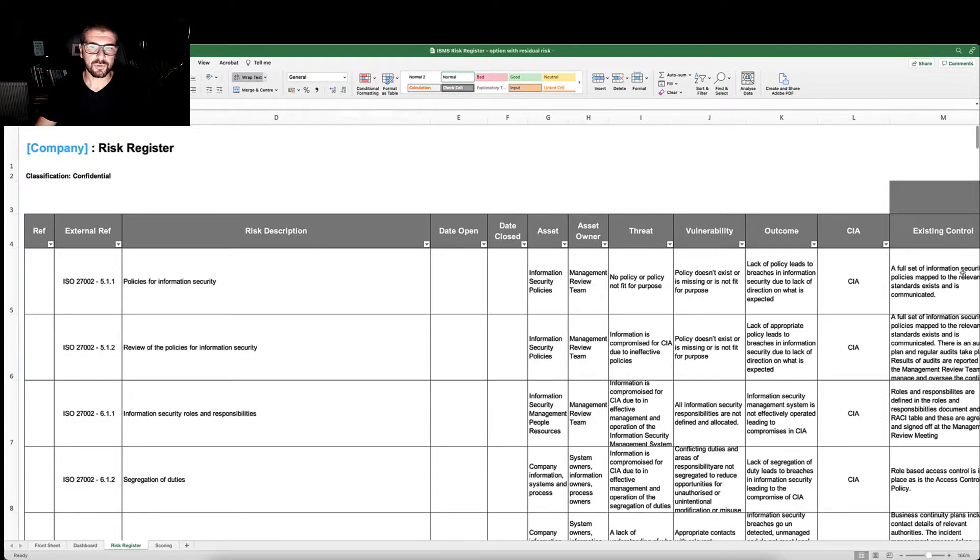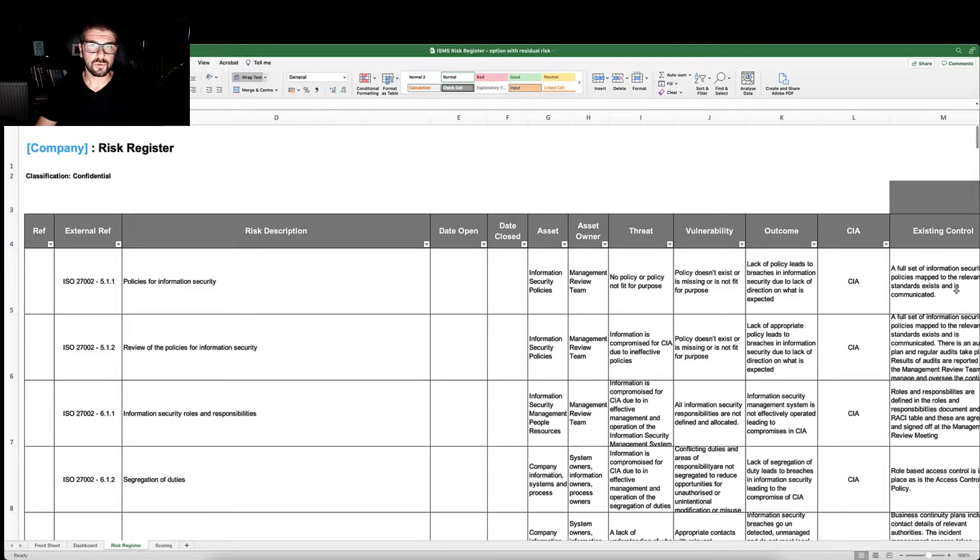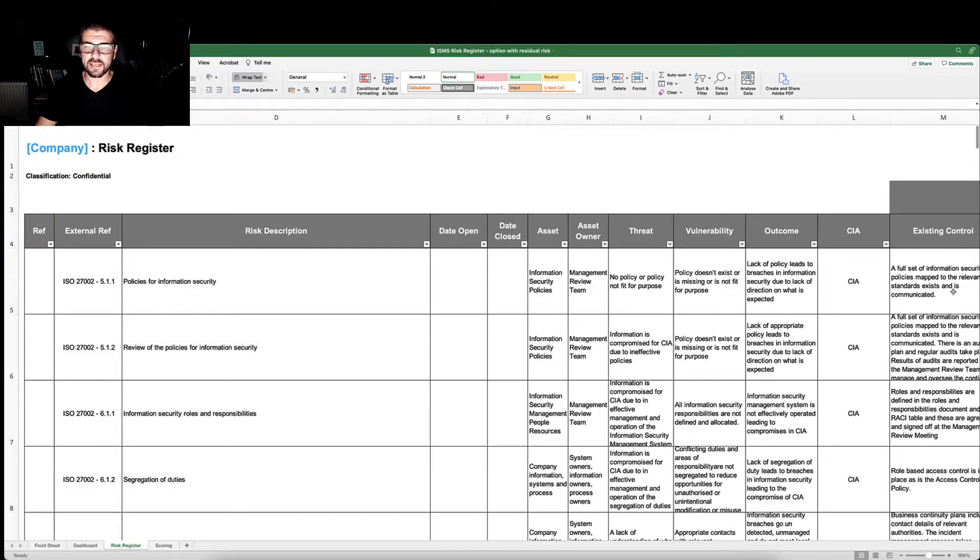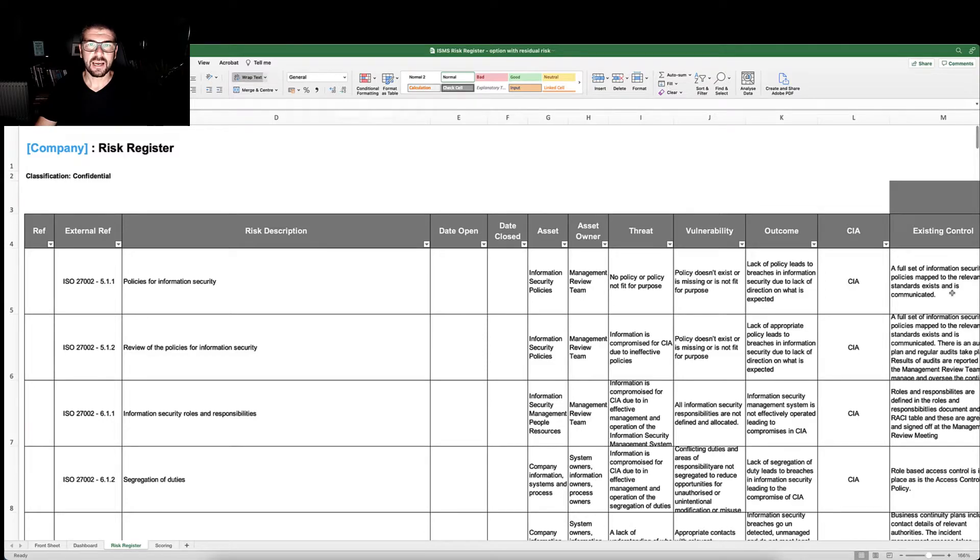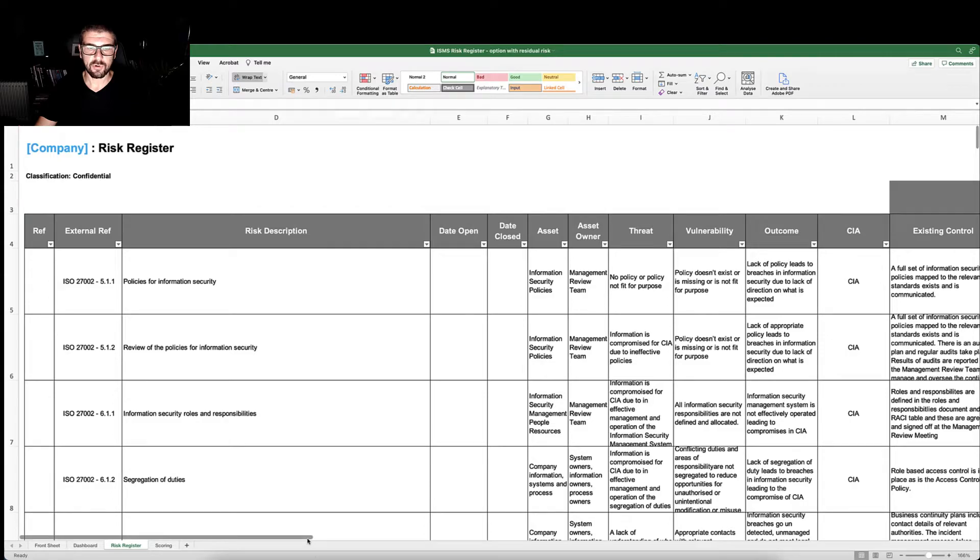We would have a description of the risk, the date that it was opened, the date that it was closed, the asset to which the risk applies and the owner of that asset, the threat, the vulnerability, and then the outcome or potential outcome associated with that risk.